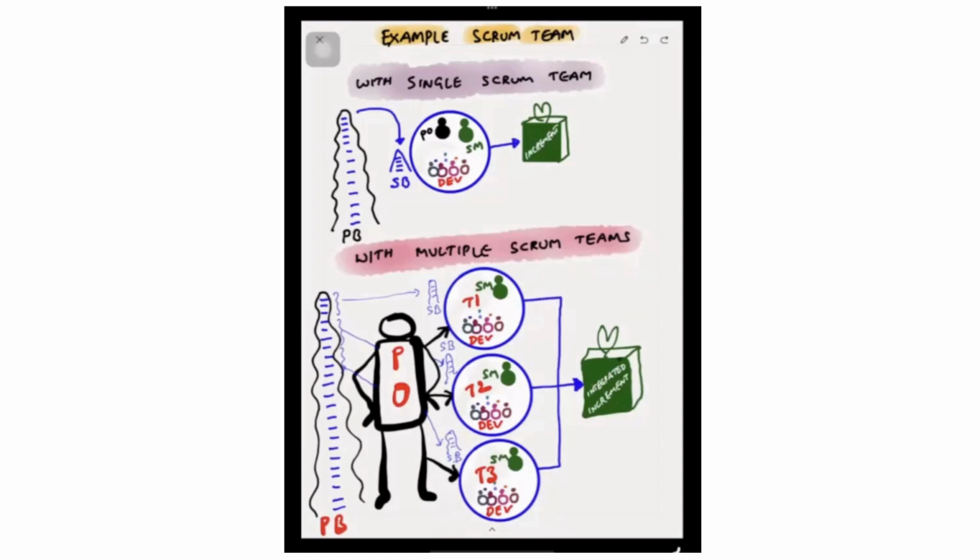When all these three teams are following the same sprint length, it will help them avoid some wastage like waiting time or dependency on the other teams. So these can be avoided and work can be done effectively. All three teams together can decide a suitable sprint length, and one of the Scrum Masters of these teams can facilitate the discussion.